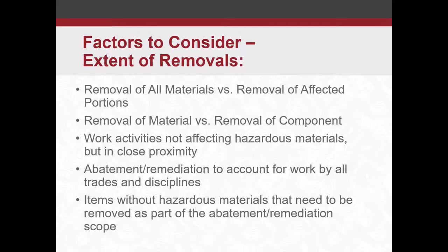That saves potential impacts and cross-contamination to the environment. It takes things out intact, so you're not scraping paint, you're not scraping ACM or PCB, and it takes a lot less time. Disposal costs might be a little bit more, but the labor cost usually outweighs that.